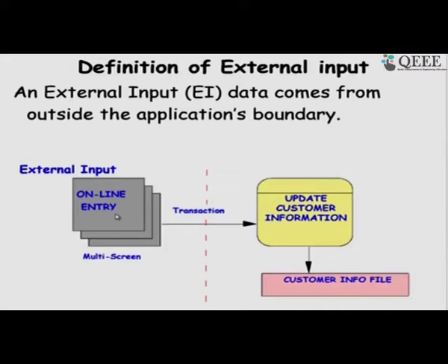For example, as long as the data pertains to one student, like his name, roll number, address, telephone number, etc., we will compute that as 1, because that pertains to one student. So, there is a bit of ambiguity about what exactly is a related set of data being input, which updates the customer information, the internal file. This is about customer relation software. So, here we enter data about the customer, and this updates the internal file.